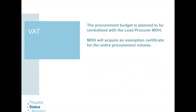One last point about VAT: the whole procurement budget of HS Monitor is planned to be centralized at the Ministry of Health of Turkey. The Ministry of Health of Turkey is exempt from VAT in international projects. When we have a centralized budget, the procurement budget of the project will be exempt from value added tax as well — so we are looking at a VAT-free procurement process.